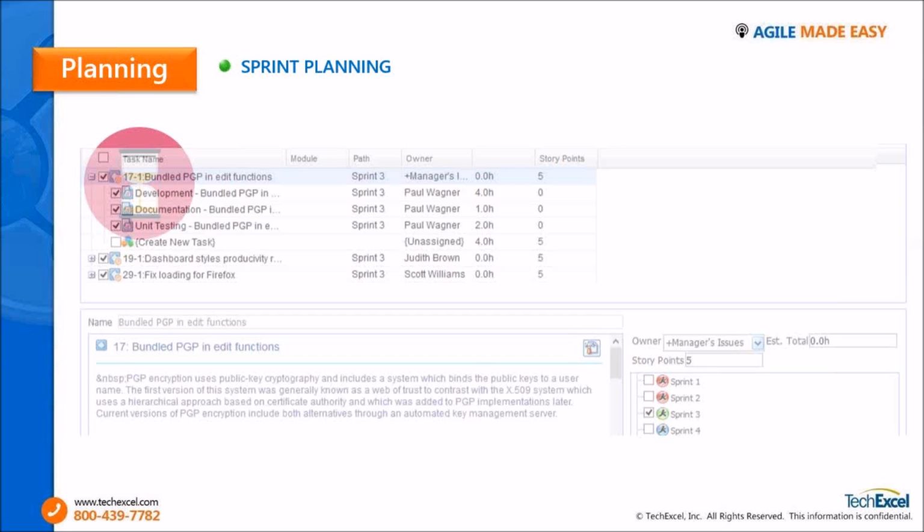Once the user stories and bugs have been populated in the release backlog, we lock down the release backlog and we do not accept any new user stories once the release starts, so that we make sure that we are focused on implementing the user stories that we have committed to.